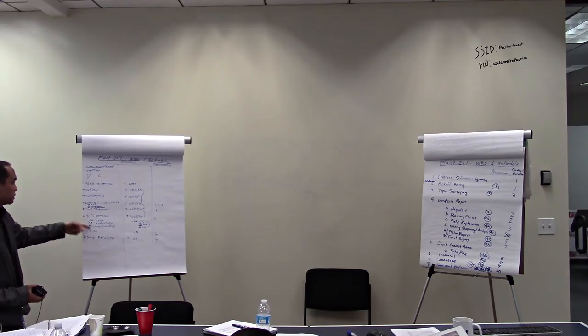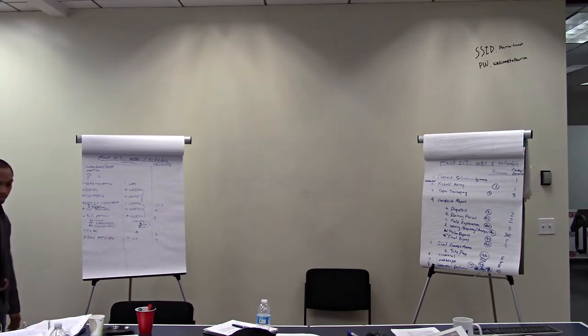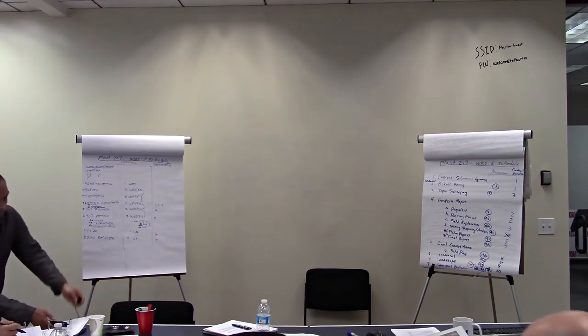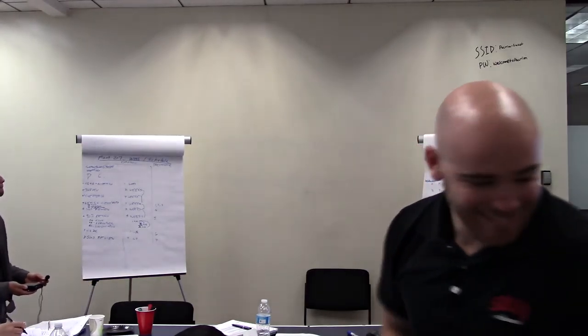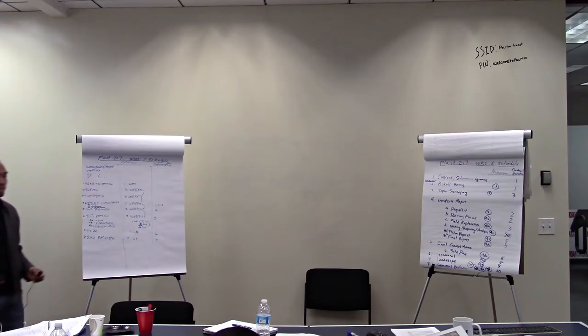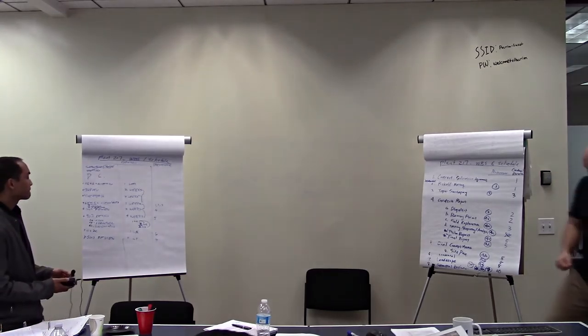We're assuming right now that's 3 weeks, and this will be the predecessor to review by the client, and we put down 2 weeks. Following that is 90% design. We're assuming 4 weeks, and that includes civil, structural, and landscaping also, and then QA, QC, and then agency review after that, and we just stopped after that. We know we have more. We have 100% design still, and then submittal to the county or the agency to review it, but we just stopped it for now, right there.